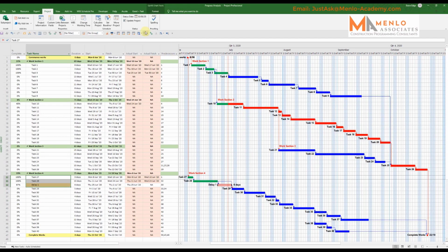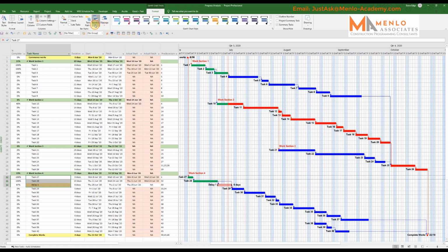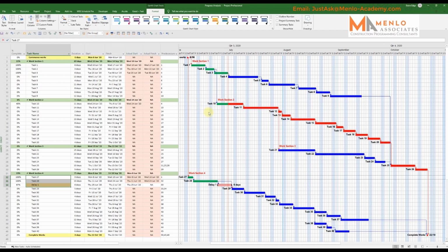And if I turn this baseline on now, into the Format tab, turn on baseline 1, you'll see that it now reflects where everything is sitting at now. Now this is important because when you are reporting for a PCG meeting or whatever, you really want to be showing day 1 is revision A of the program, and that's your intended program for the job coming up.